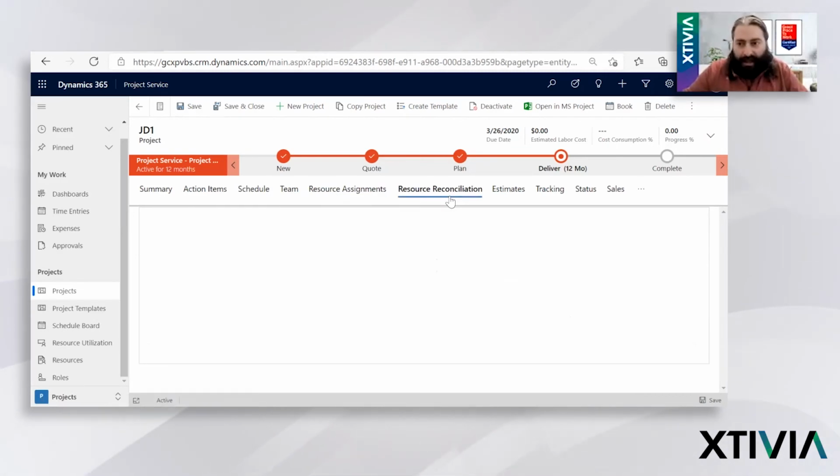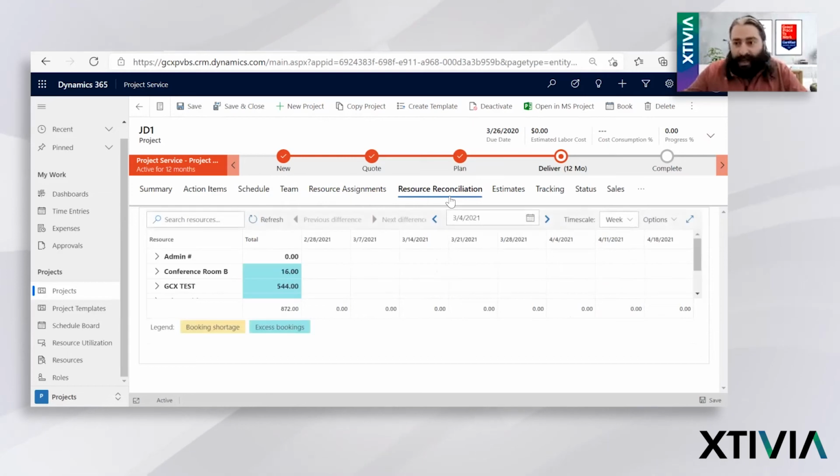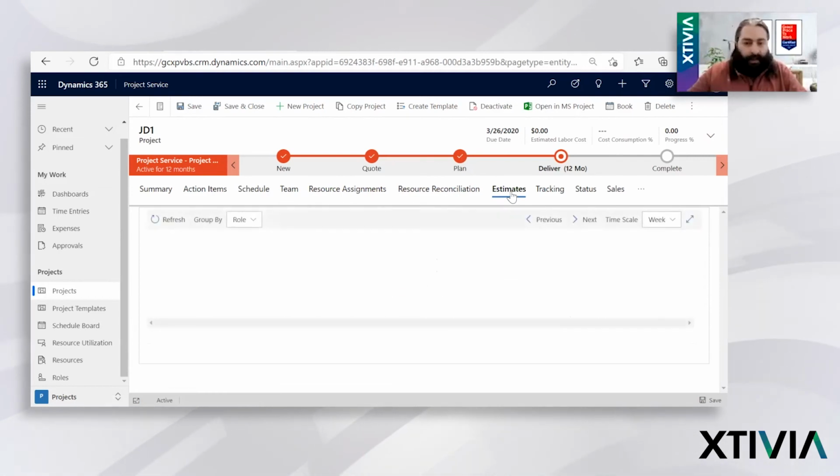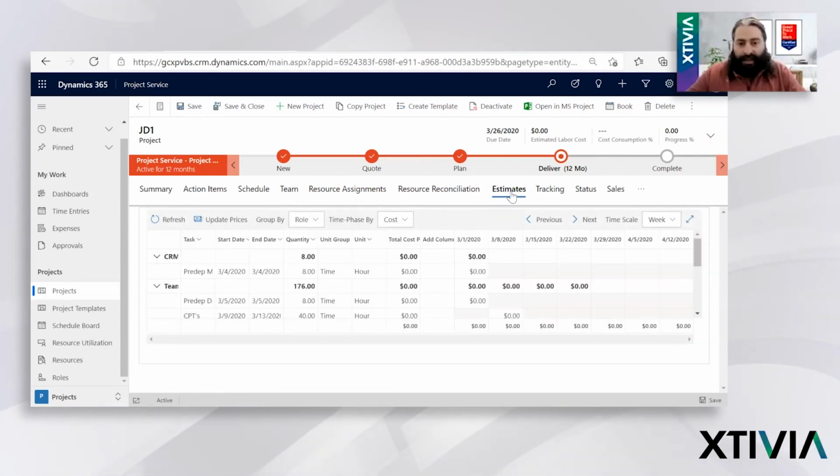It allows your team to collaborate together. If you're used to Microsoft Project, you can export data out to Microsoft Project and look at it that way. All of that information can be easily tracked inside of the system. If I want to track estimates, then I can see, okay, we estimated 500 hours on this versus the actual so far, we're at 400 hours. So we're at 80%, and we're not 80% of the way done. You can build triggers and notifications in that, to get out ahead of that potential issue as early as possible.